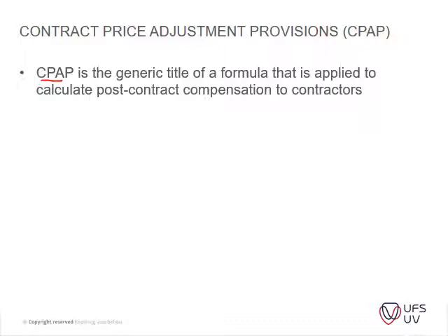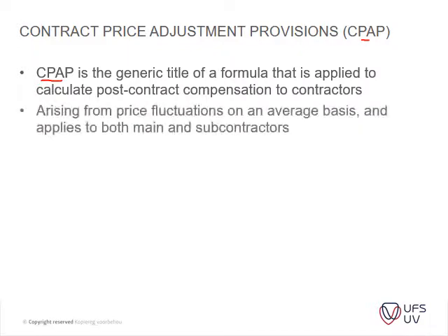So there's a set of adjustment percentages, the inflation rates, for instance, for steel work, for earthworks, and for carpentry, wood, and those items fluctuate continuously. So the Bureau of Economic Research, Stellenbosch, publishes indexes that's usually used for your CPAP, and all that it says, it's just an adjustment of the rates according to inflation.